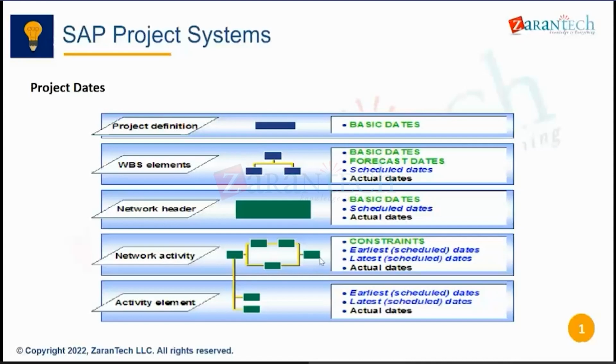Then it will take the final date we got. From there, it will take that earliest finish as the latest finish, and from the latest finish it will calculate in the reverse manner. So it is called the backward run. This is all project management terminology, and we should get acquainted with this terminology. So this was the forward run of the schedule, then I'm going for the backward run of the schedule. This goes from the last activity back to the first activity. In the forward run, it goes from the first activity to the last activity.